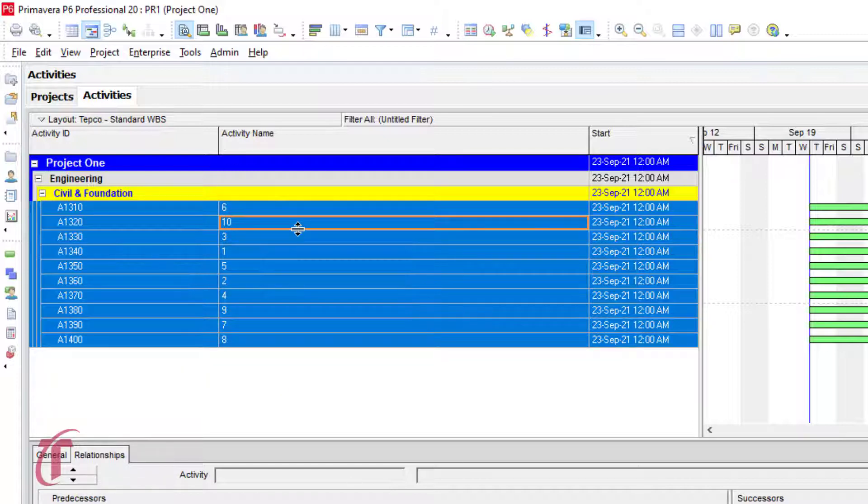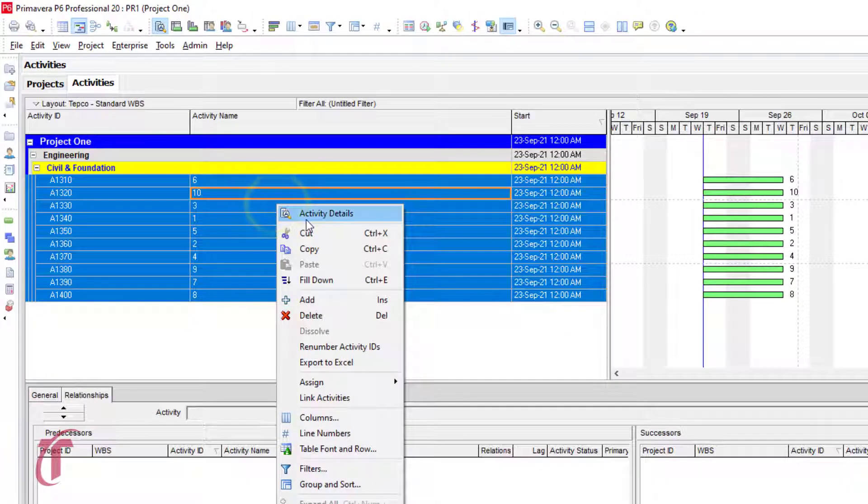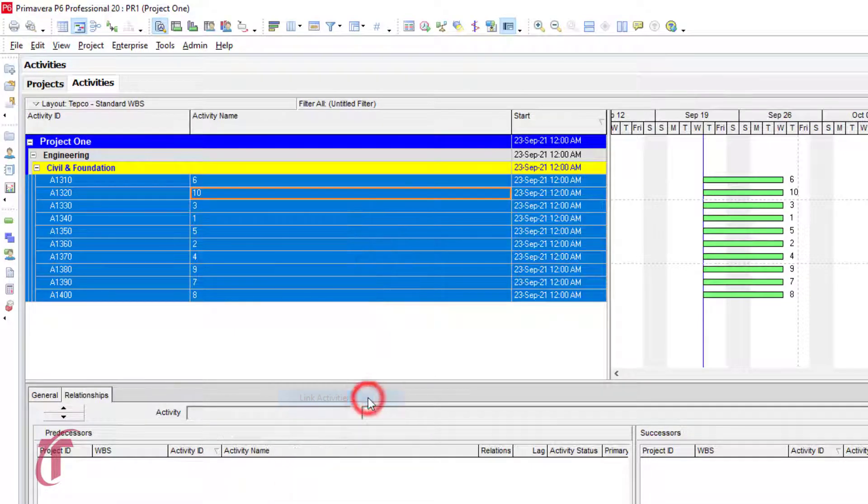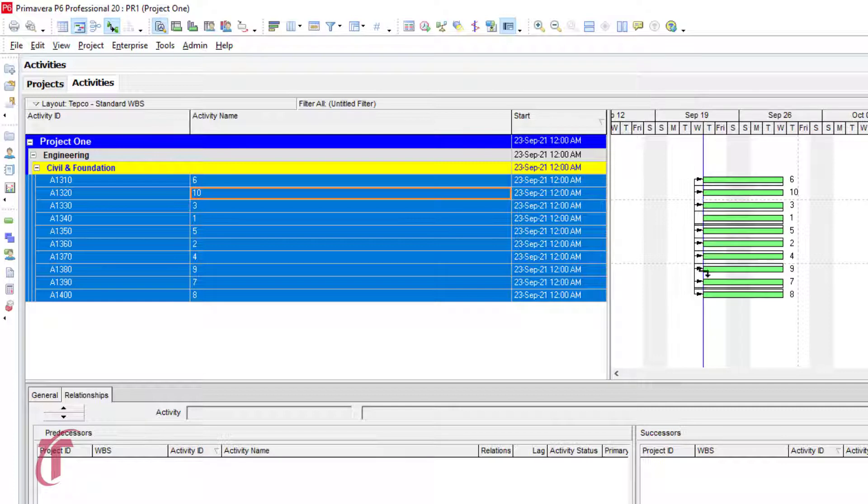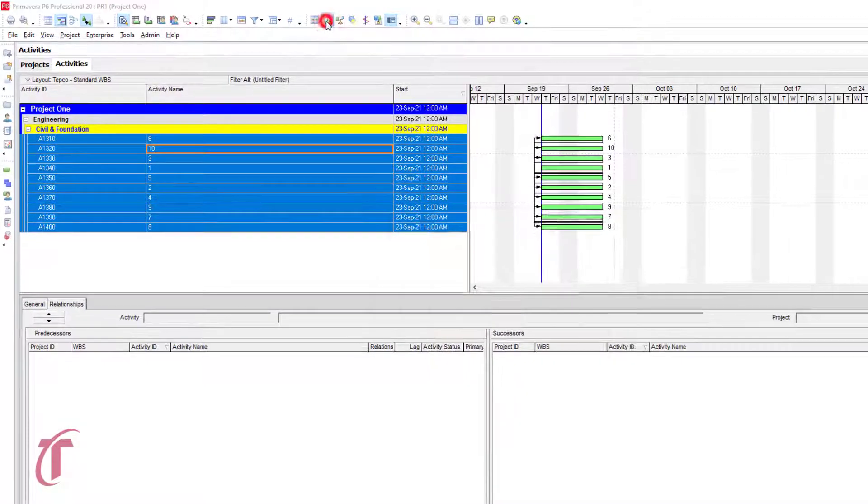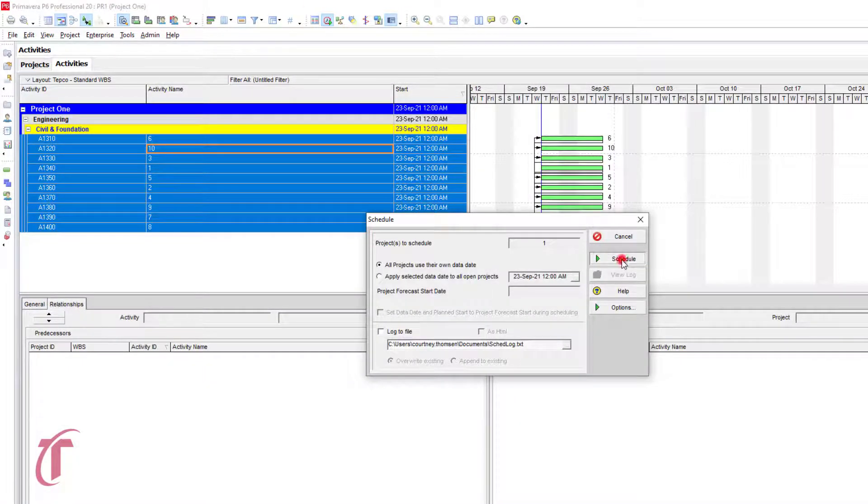The order in which you select it is remembered by P6 and it will link those activities in that order. So after selecting our activities, right click and we're going to click on link activities and we can turn on the relationship lines right here. So we can see that we now have a relationship between each of these activities. To schedule the file, we can press F9 or click on this little icon at the top and then select schedule.